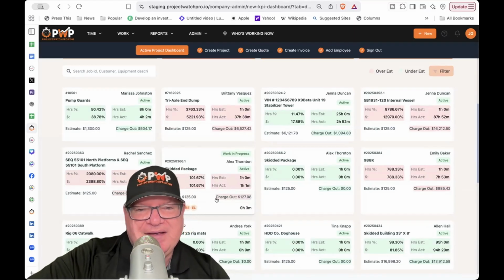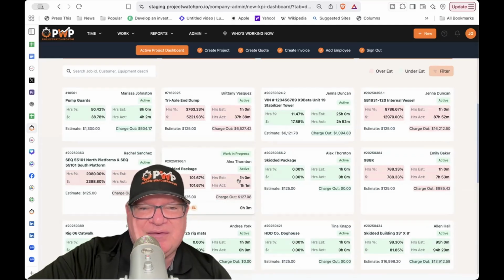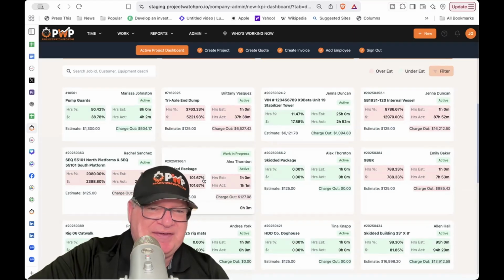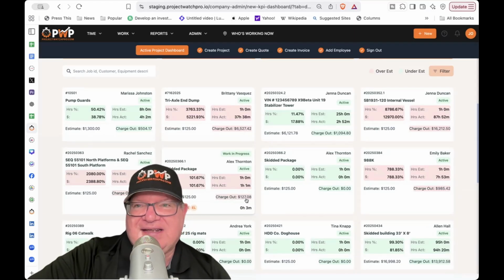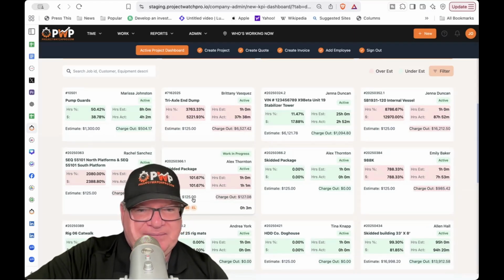So you can see it just turned red, which means we're already over budget because the estimated hours was 1 and the actual is 1 hour and 1 minute. So we just went over budget.